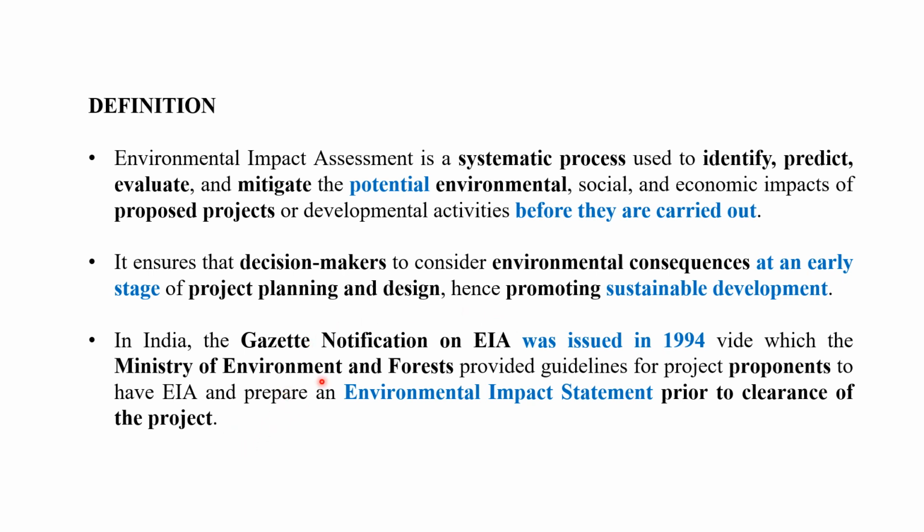In India, a Gazette notification on EIA was issued in 1994, in which the Ministry of Environment and Forest provided guidelines for project proponents to have an EIA and prepare an environmental impact statement prior to clearance of any project. So whatever projects we are going to start, before that we have to go for environmental impact assessment.